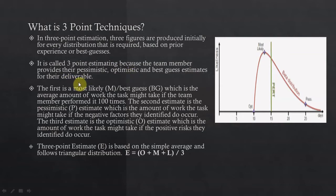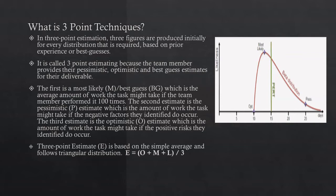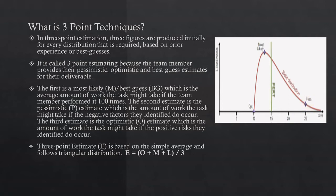The first is most likely, which is the average amount of work the task might take if the team member performed it a hundred times. The second estimate is pessimistic, which is the amount of work the task might take if negative factors occur. The third estimate is optimistic, which is the amount of work the task might take if positive factors occur.